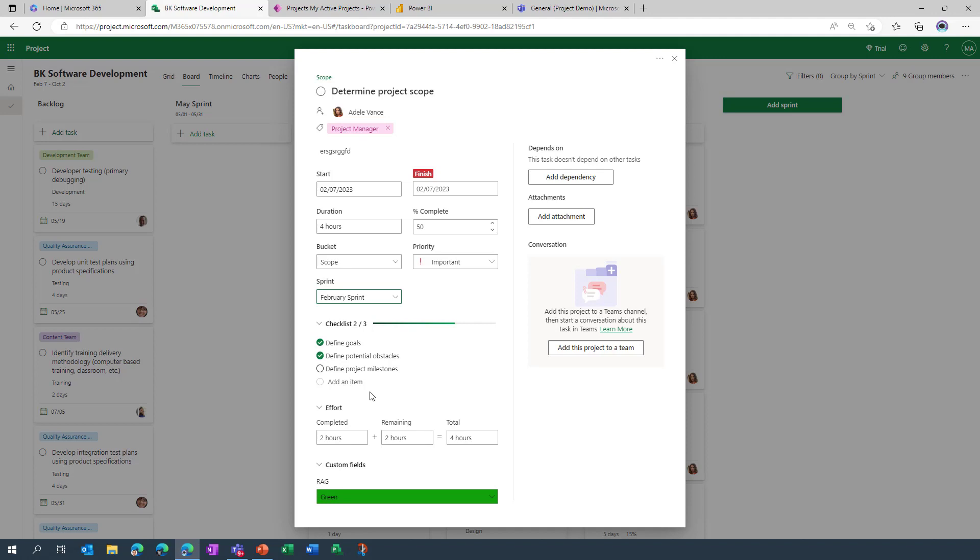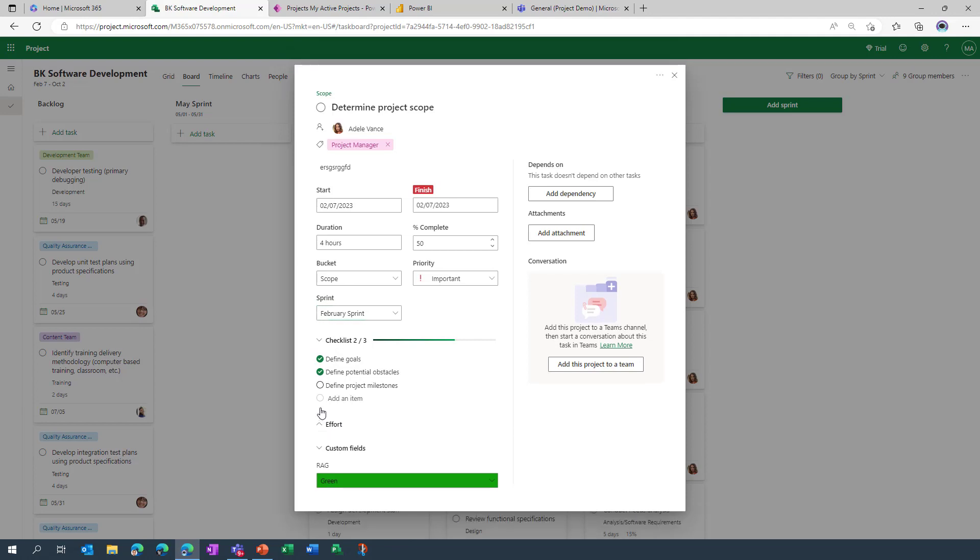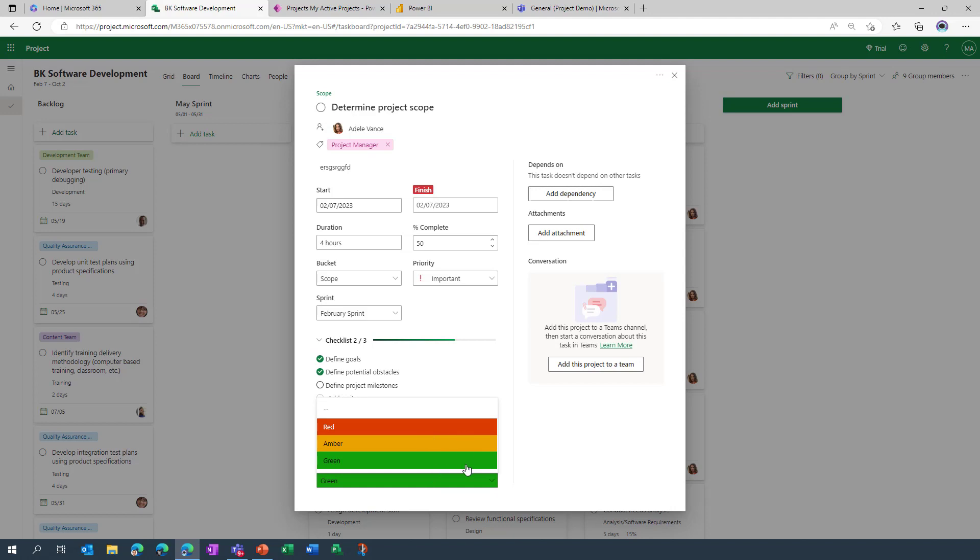We've got some effort fields here at the bottom and you can also go in and populate custom fields. And there's an example of this here, it's a RAG field whereby you can go in and set the status of the task in terms of is it on track, is it falling behind or so forth. You can also add dependencies so you can link this task to another task, you can either search for it or in some of the other views you can actually be presented with some tasks that the system thinks you should be dependent upon.